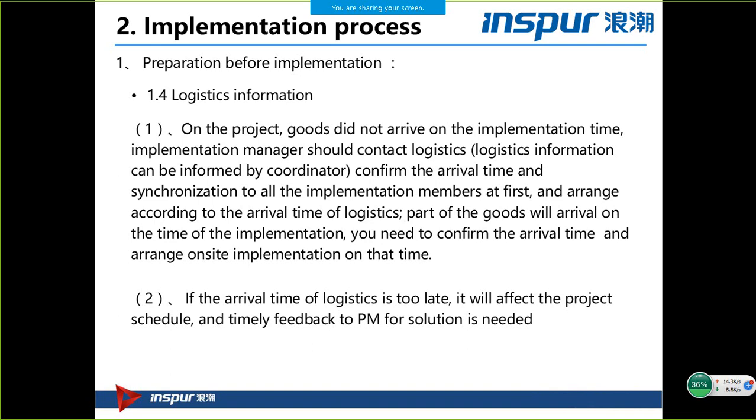And you can check the surroundings and the packages of the servers, if there is any damage, and don't forget to take a picture and give the feedback to our PM or coordinator. And also, if the arrival time of the logistics is too late and it will affect the project schedule, give the feedback to the PM in a timely way.